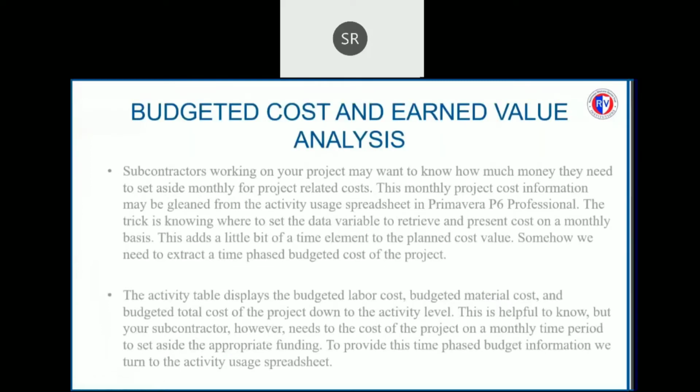And finally, coming to the budgeted cost and earned value analysis, which is obtained after every task is over. Subcontractors working on a project may want to know how much money may be needed to set aside monthly project related costs. This monthly project cost information may be obtained from the activity usage spreadsheet in P6 Professional. The trick is knowing where to set the data variable to retrieve and present cost on monthly basis.